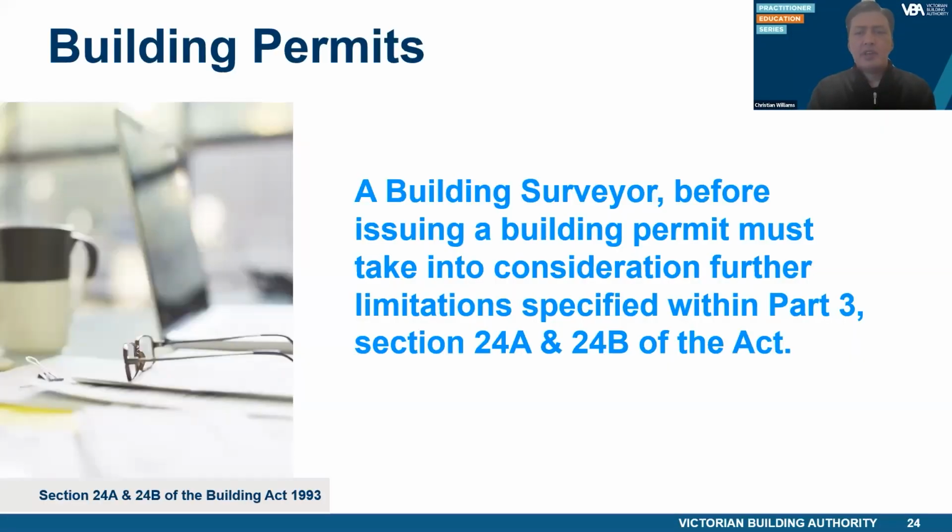A building permit can only be issued when a building surveyor is satisfied the proposed building work meets the minimum standards of safety and amenity as set out in the Act, the regulations and NCC. A building surveyor, before issuing a building permit, must take into consideration the further limitations specified within Part 3, Section 24A and 24B of the Act.